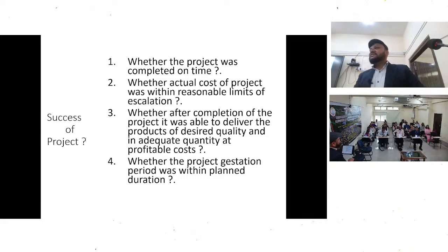And how do we measure the success of a project, whether any project is successful or not? The first thing is whether the projects are completed on time or not. Since I came to the Brahmaputra Board, I am seeing a lot of projects are dragging, they are running out of time, time overrun, and due to time overrun, there is also cost overrun. Then we have to see whether the actual cost of the project was within a reasonable limit of escalation. Third, whether after completion the project was able to deliver the intended benefit or not.